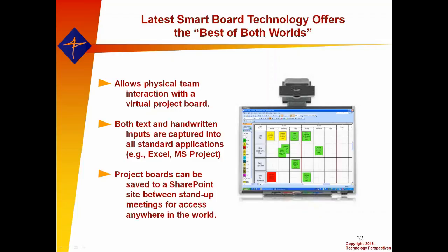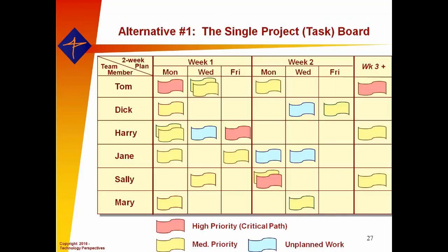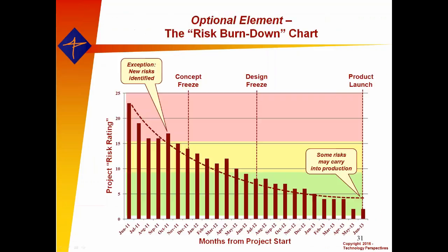On slide 24, you have the risk chart. Do the bars represent the various types of risk that have been identified? No, actually, the bars represent an aggregate metric of the overall risk on the project. Since we have a couple of questions, I'll just answer that quickly. The height of the bar, you notice the y-axis has a scale from 0 to 25. I use 1 to 5 metrics to assess risk: probability on a 1 to 5 scale, impact on a 1 to 5 scale. Then we multiply those two numbers together to create what's called a risk priority number, 25 down to 1.